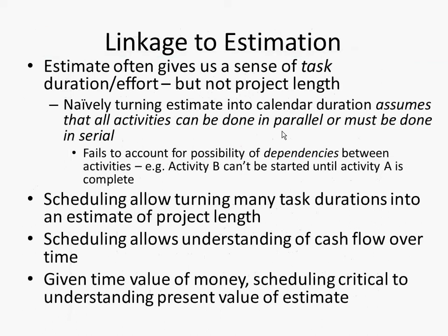So we've just been talking about estimates. The estimates are great. They give a sense of task duration and effort. But they don't give a sense for a whole project, and not necessarily even for a whole deliverable. If you naively just turn estimates into calendar dates, totaling up the estimates, you'll be ignoring some things. You'll be ignoring dependencies between activities, where one activity can't start until another one is finished.